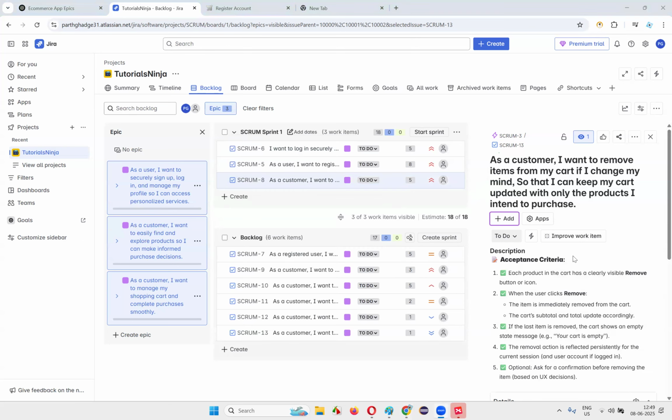Is everyone clear with the sprint planning meeting? Based on the discussions in the sprint planning meeting between the product owner and the team, some agreements are made, like the development team saying that we can work on that. Accordingly, the product owner has moved some user stories from the product backlog to the sprint backlog. Now the sprint is ready. Is this part clear for everyone? Okay.